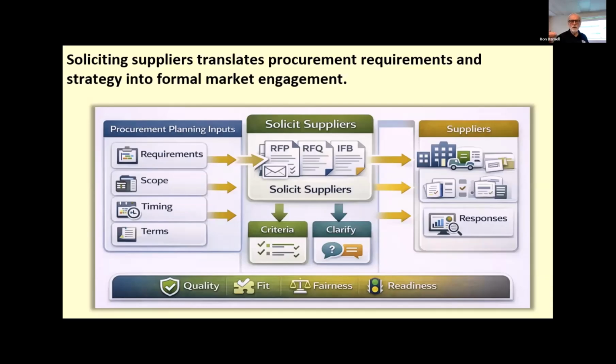In the class notes, I talk about this stage through the creation of project documents, such as requests for proposals, requests for quotations, invitations for bid. And each of these is structured to communicate our project needs, scope, pricing expectations, evaluation criteria, and things like that.